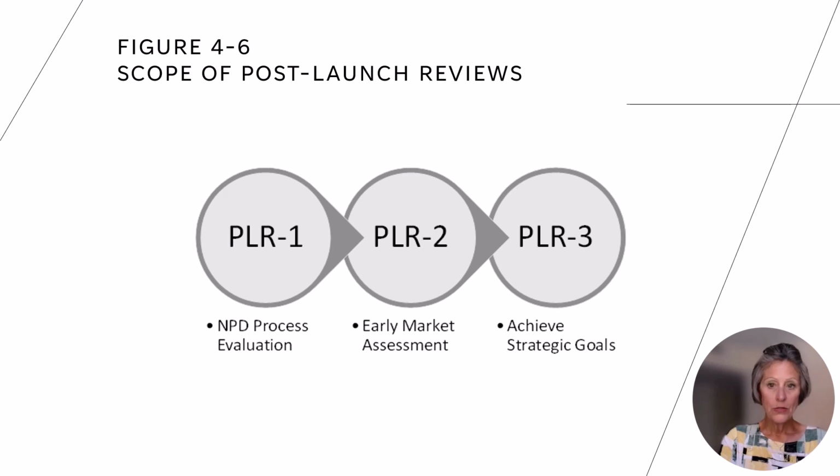Gate 3, scale production. Gate 3 approval is a significant milestone in the staged and gated process. Bob Cooper has called this decision the money gate, since the amount of spending for subsequent stages of work are substantially more than in the front end of innovation. Investment in manufacturing processes can be expensive and time-consuming, requiring engineering and construction resources.